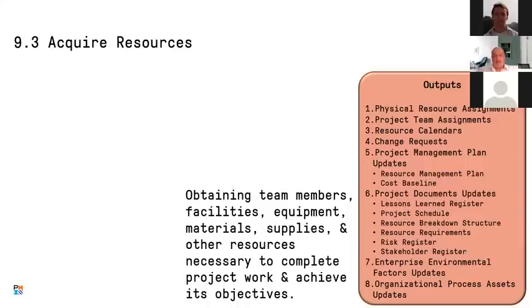The resource calendar is one of the things that, if you have worked on MS Project or Primavera or other time schedule software, you will find important. What is a resource calendar? Let's say that we need 2 architects. One architect is working 5 days a week and the other architect is working 4 days a week. So each resource has a different calendar. While planning our project, we need to understand who's working when.